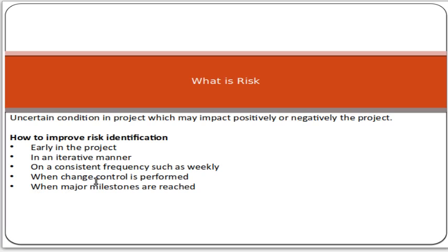When change control is performed, whenever there is a change, you should identify whether any new risk occurs after the change or not. When major milestones are reached, you have to identify the risk at that moment as well.